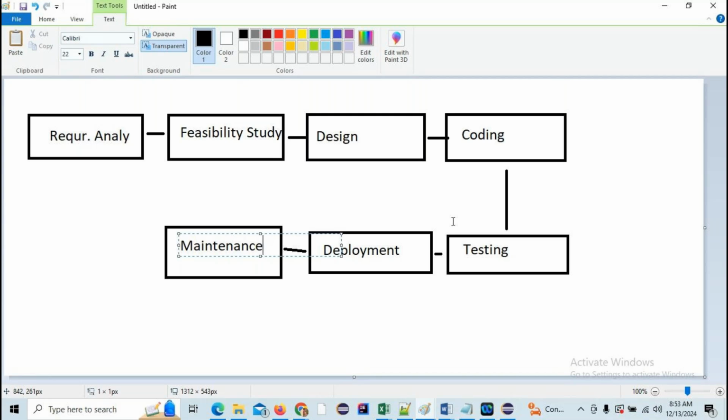Okay, I reach a software company named TCS, for example. The first thing TCS will do is requirement gathering. That is, they are going to collect the requirements from Harsha Bank, what exactly they are looking for. That document is called the customer requirement specification document, called CRS for short. When the Harsha Bank people give that CRS document to the TCS company, the TCS company will analyze the requirements. First, they collect the requirements. First, they gather the requirements.